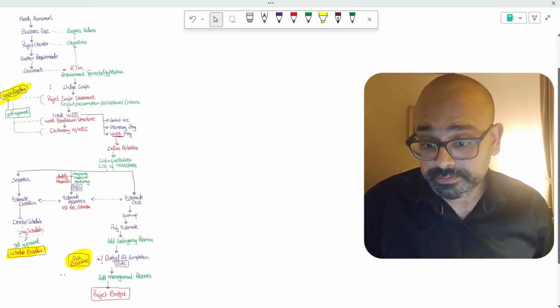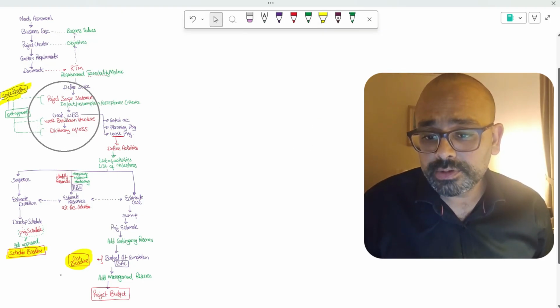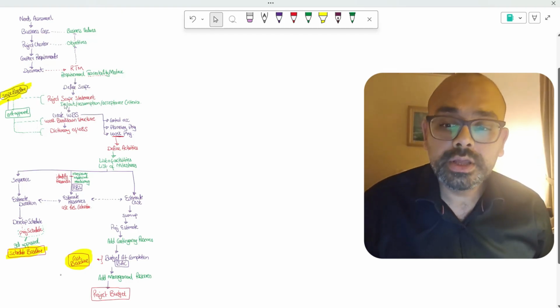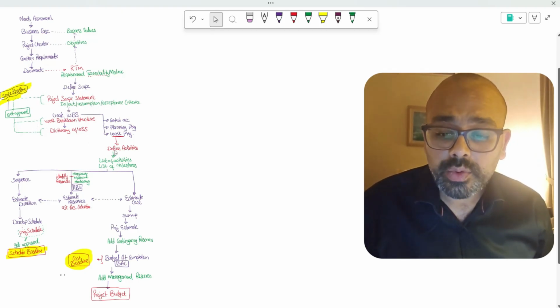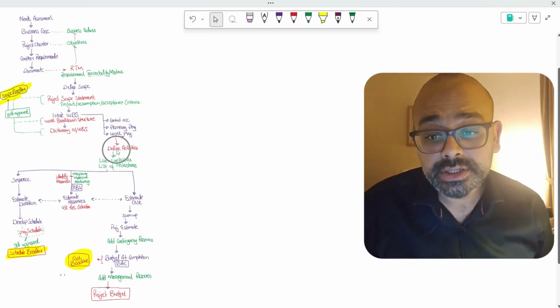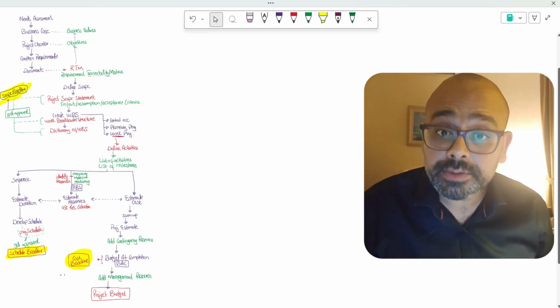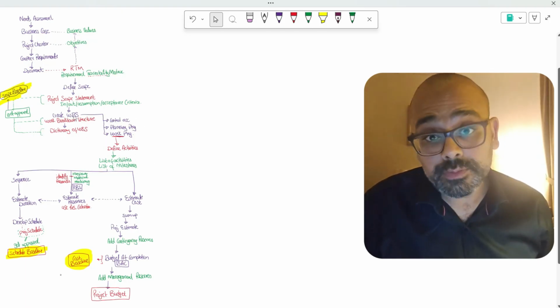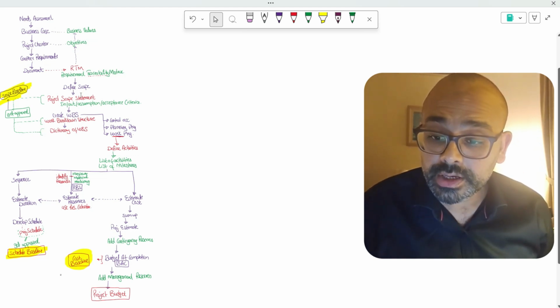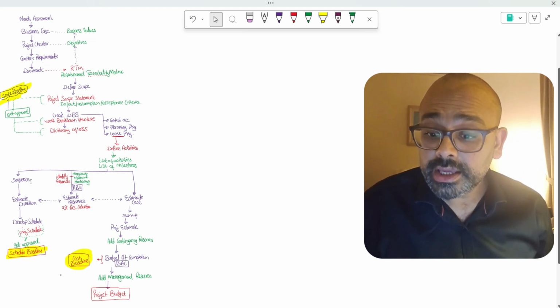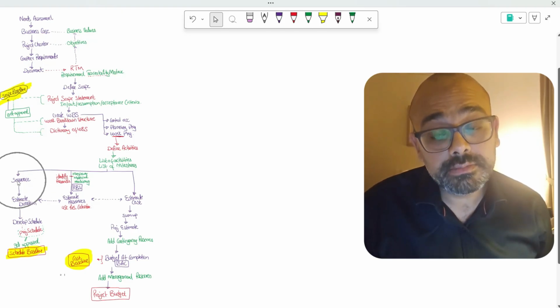For example, I want to create the WBS. What do I need? I need to have a scope statement. I want to define the activities. I need to have a WBS for that. If WBS is not there, I need to have a scope statement, right? I need to sequence my work.